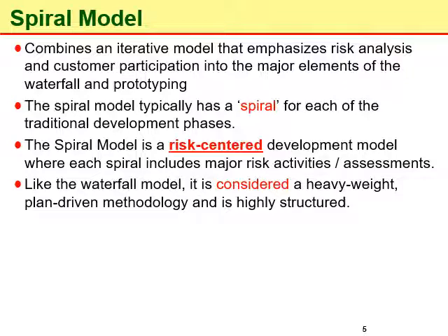And it in fact couples the iterative nature of prototyping with the controlled and systematic aspects of the waterfall model to introduce a more risk-oriented approach. So one of the key features of this model that distinguishes it from the other models is that this is a risk-centered model that considers risk analysis important to be performed in each spiral or each iteration.